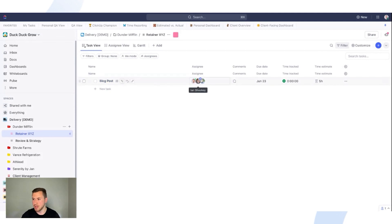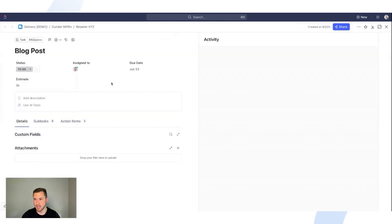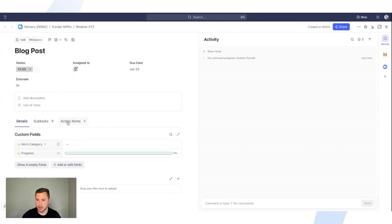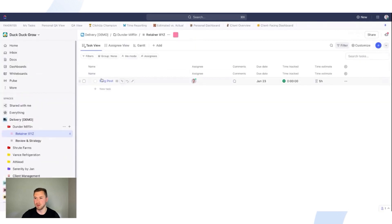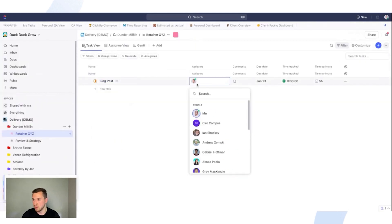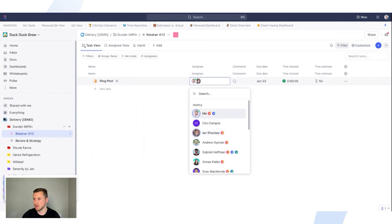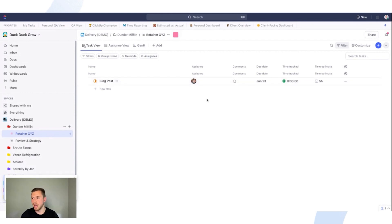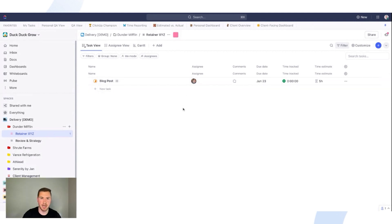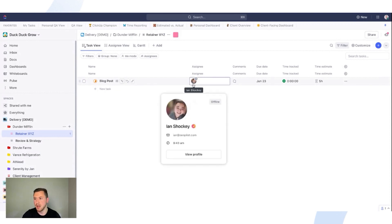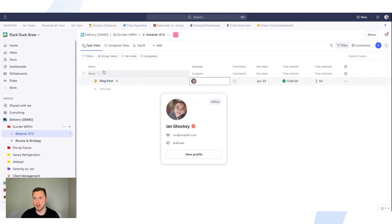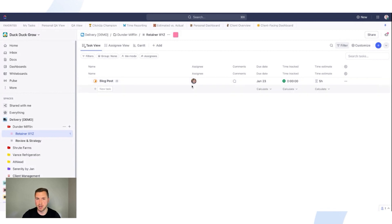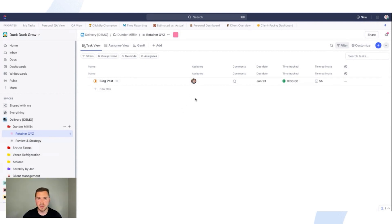In addition, maybe you only assign one person to each of these. So maybe I'm assigned to the blog post. However, say I start writing it. I come here to the action items. I check this off. And now I want Ian to review this. So maybe I come here. I set it to internal review. And then I reassign this task to Ian right here. And I just comment and say, hey, can you start working on this, review what I've written? Once you start doing that, you again, if you want to use the workload view inside of ClickUp, the workload view is going to be tied to due dates, time estimates, and the assignees. So then I'm losing all of that visibility. And things will really start to slip through the cracks here. So never, if you're in this phase where you have just tasks for this and you're using the status and reassigning work, that's a big no-no. And it's going to make things slip through the cracks and not give you any visibility that you're trying to get out of the tool. So that's really sort of stage one here.